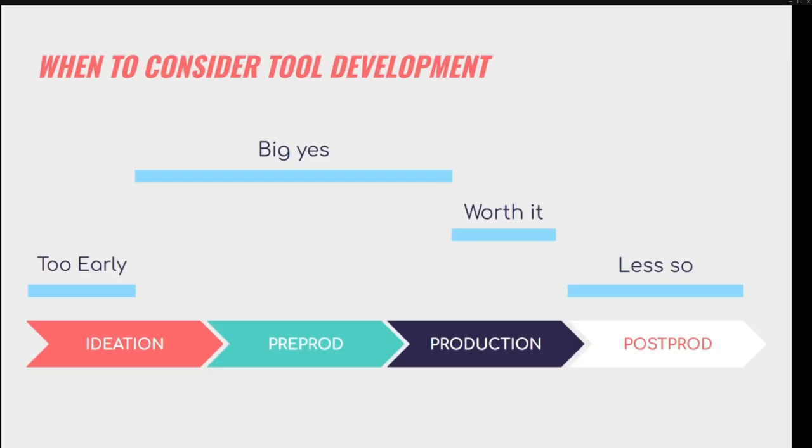Normally, you should really start honing into tools development once some of those ideas begin to crystallize, so late into ideation, early into pre-production. As those tools become realities and the workflows become established, you can use the new times to figure out, okay, if it takes this long with these tools to make, I don't know, this amount of levels or abilities or dialogue trees or whatever content you need, you can then scale that to understand how long production is going to take, right?